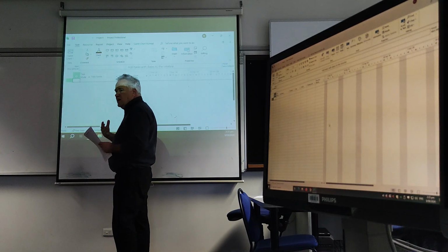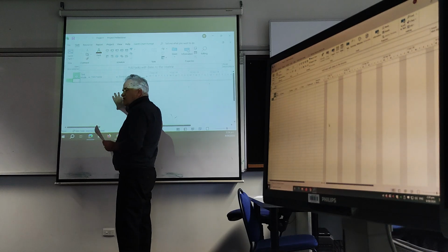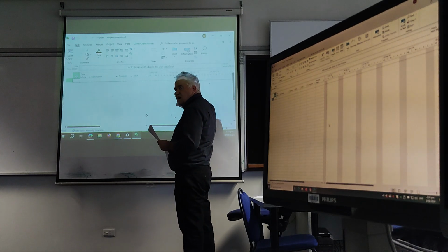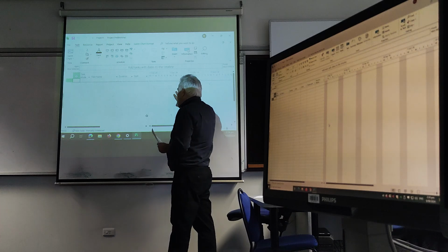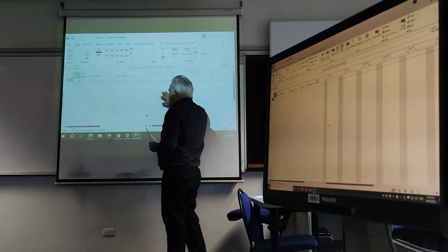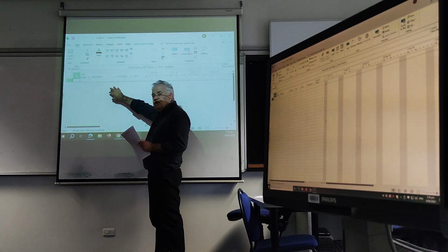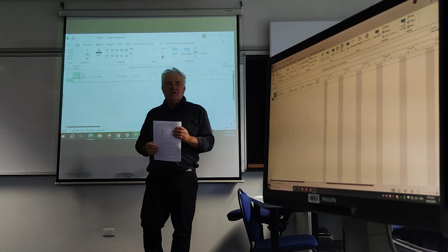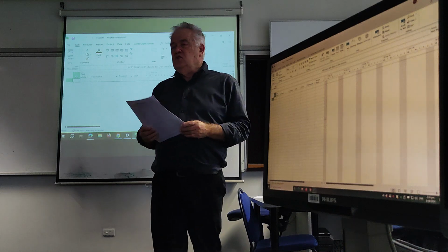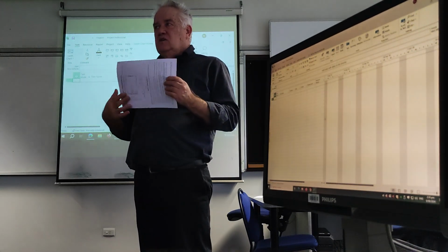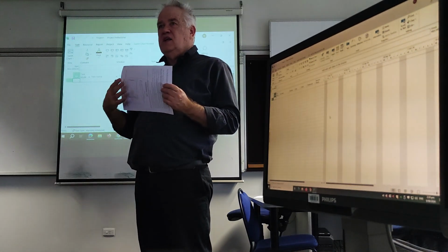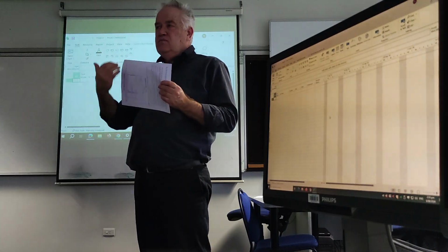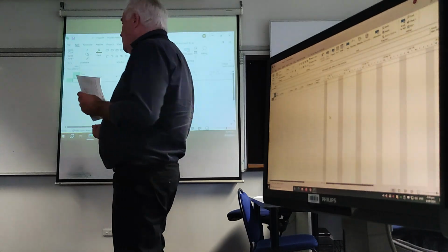Sometimes students will give me a couple of pages of the table, and a couple of pages of the chart. Doesn't make any sense. This is just a whole lot of bars, this is just a whole lot of numbers. That only makes sense when they are side by side. So one of your challenges is to present your Gantt chart so it is all on one page, and I suggest you use an A3 size paper with maybe 30 or so tasks.